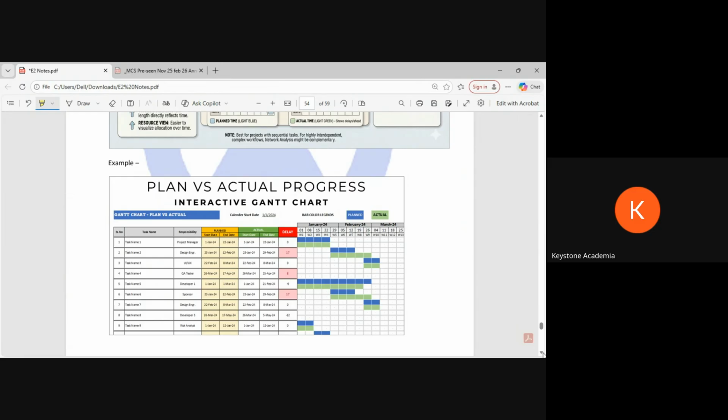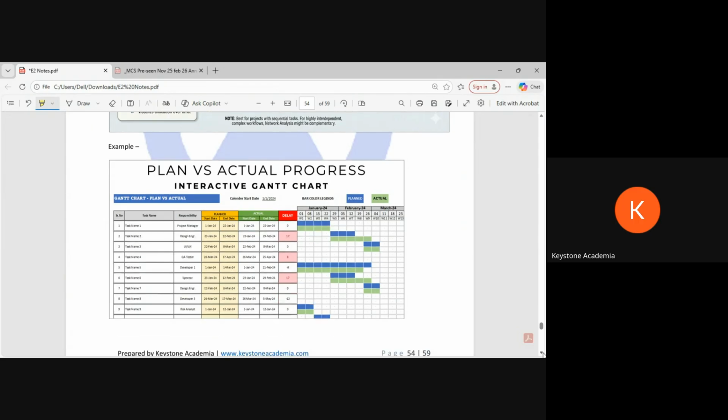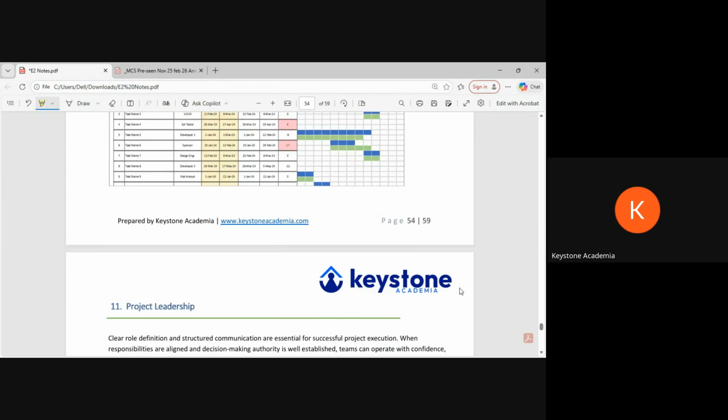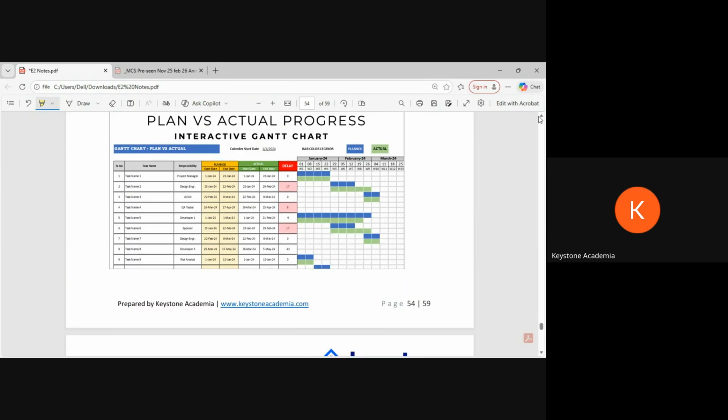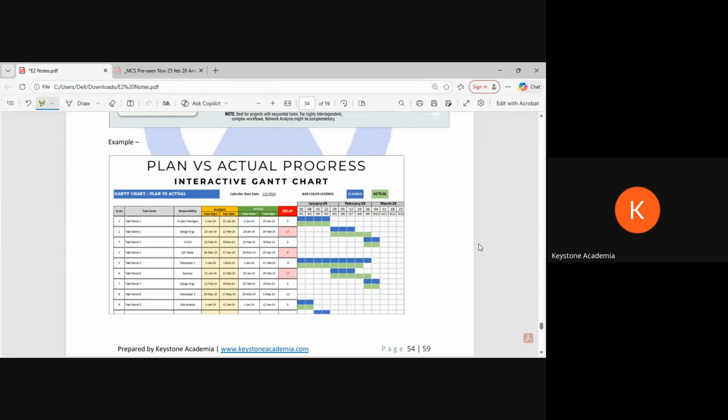Why? Because we didn't do as per the plan, or many times the raw material price has gone up, or we didn't do a proper risk management to control that raw material. Let's say we have not done a forward contract, hedging, which can be leading to a failure.